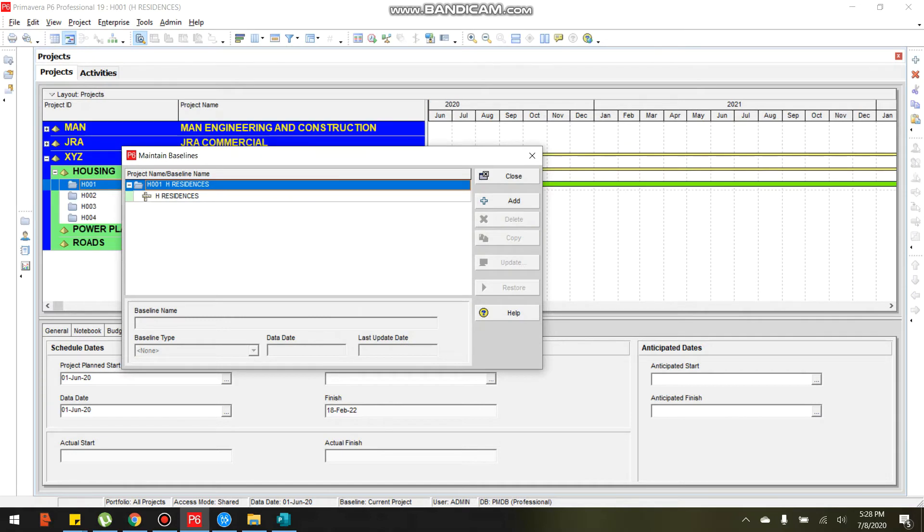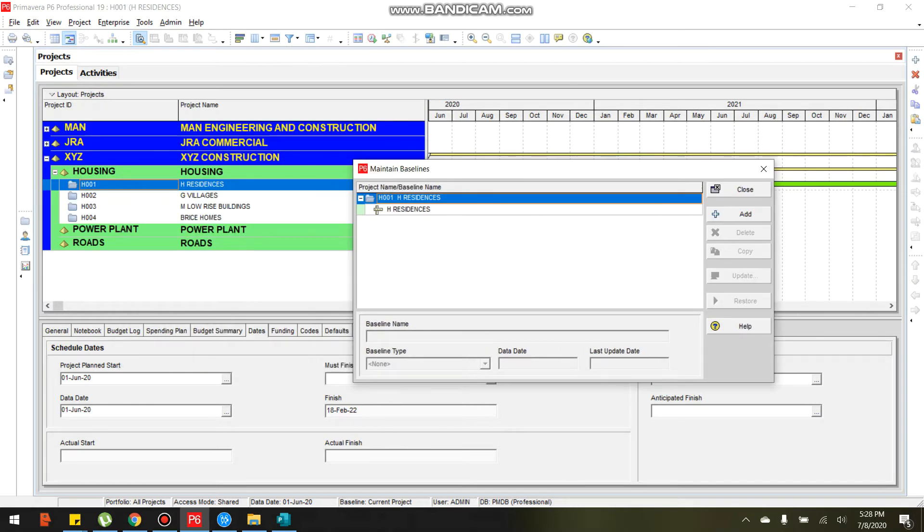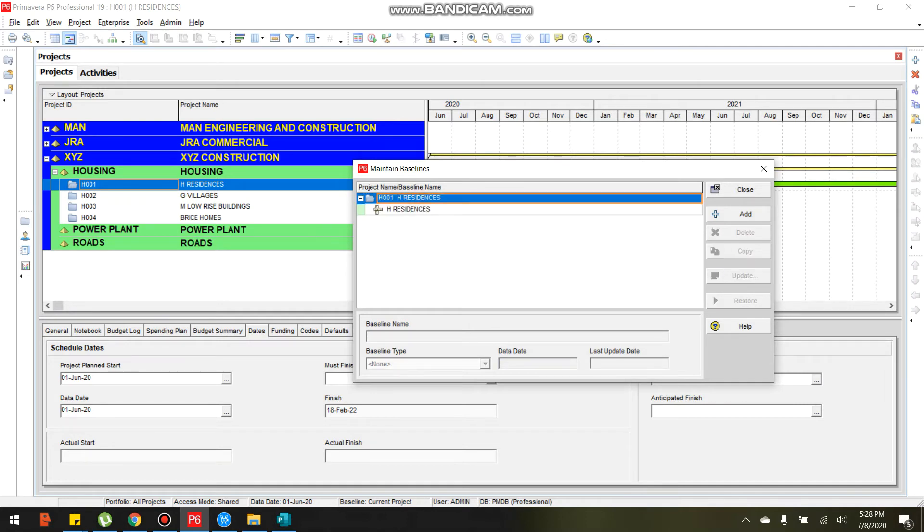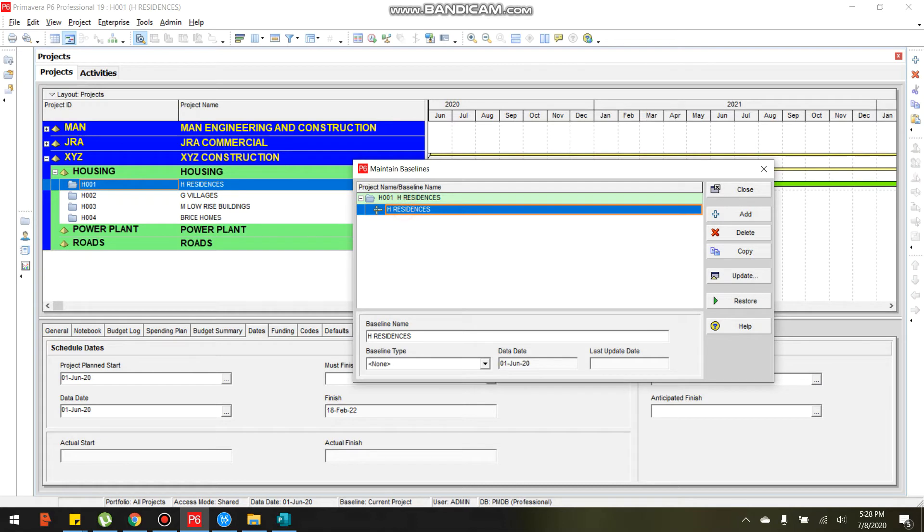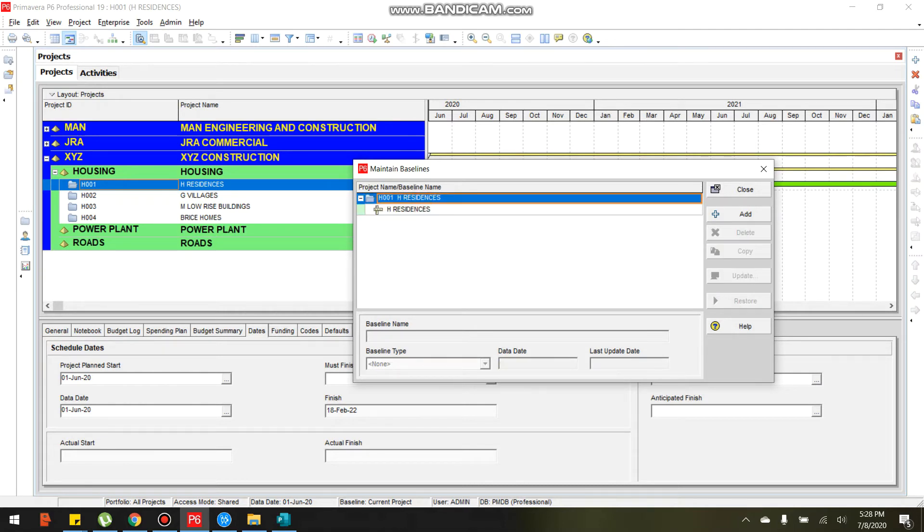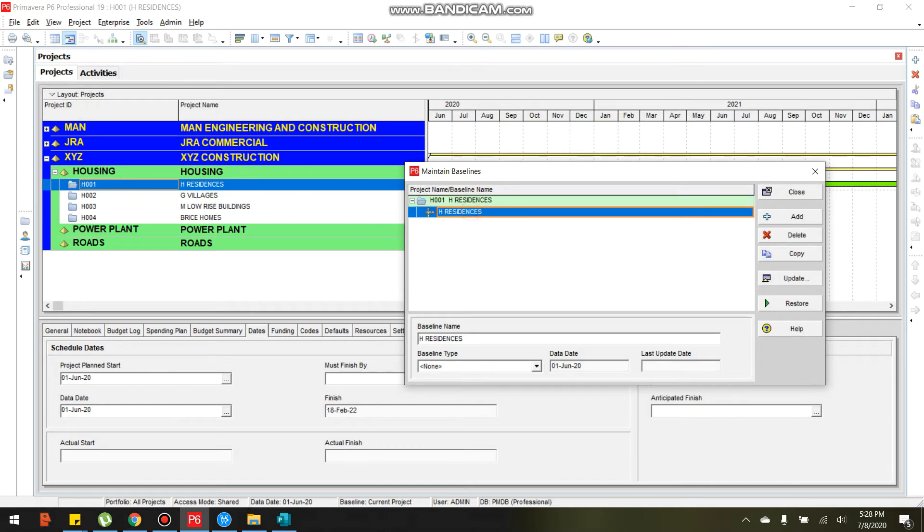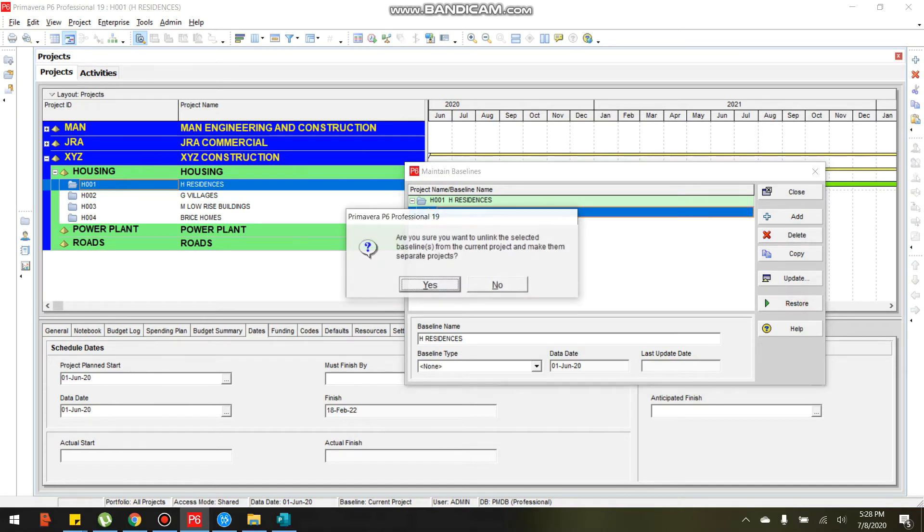As you can see, the copy of 8001-1 is the baseline of 8001-1. And as you can see, since we converted the copied one, the 8001-1, it did not reflect here in the project. If we wish to restore that, let's click this baseline and click restore. Let me show you again, click restore. Are you sure you want to unlink the selected baseline from the current project and make them separate project?